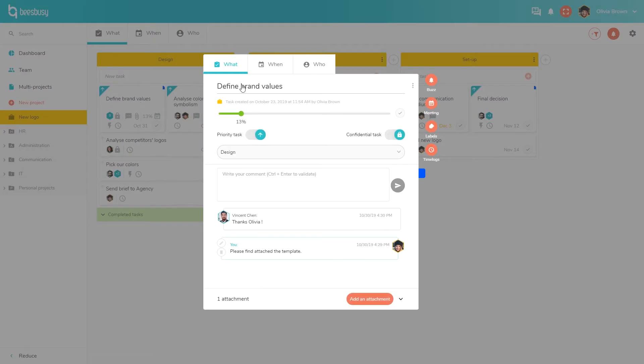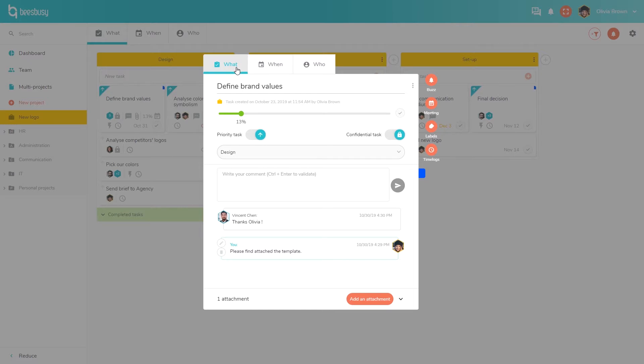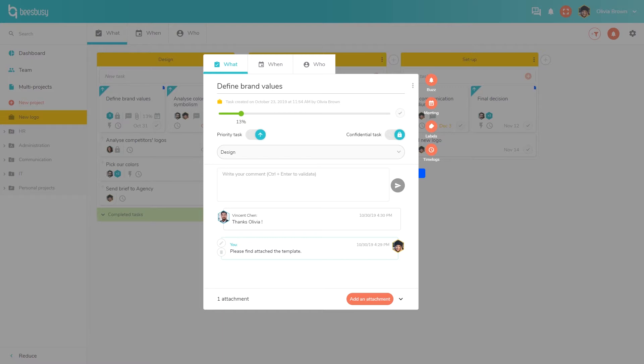There you will find the three dimensions used for project management: What do I have to do? When should I do it? And who will do it? In the What tab, you can specify a progress percentage. You can also set this task as a priority, but I will get back to this later. And you can also set the task as a confidential task. It is very useful in case of a shared project. For example, when working with a client, if you have a task for your team only and don't want your client to see it, only members of a confidential task will be able to see it and access it. You can also add comments and attach documents here.